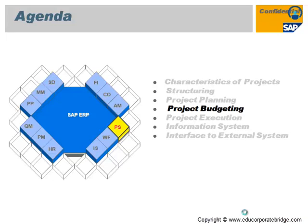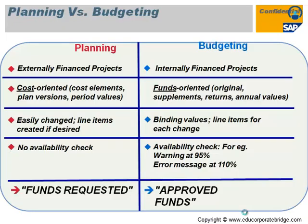The next topic is project budgeting, showing the typical planning versus budgeting in SAP Project System. Planning is done for externally financed projects — you plan your cost across the project on a WBS. Budgeting is for internally financed projects, representing fund allocation. Planning involves procuring costs for materials, services, and overheads, while budgeting controls cost across the fund allocation.